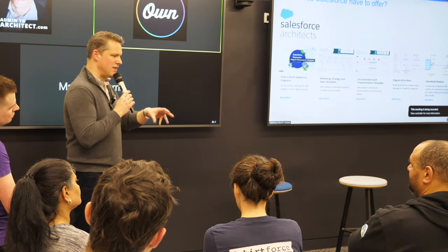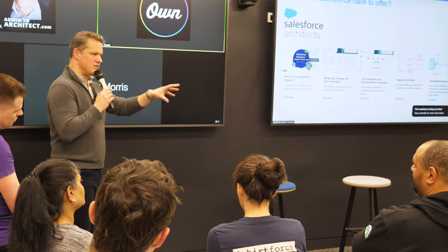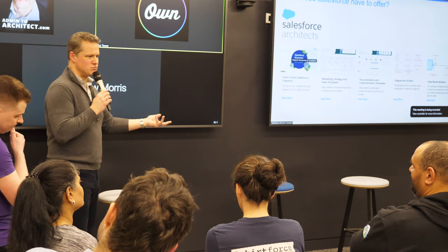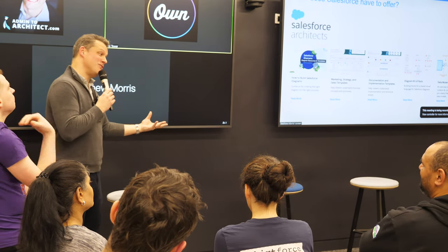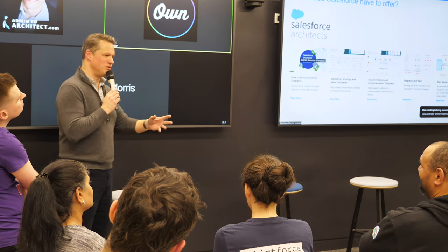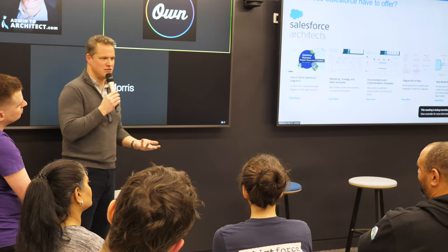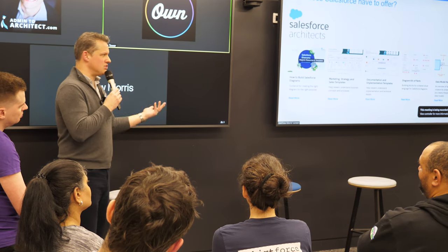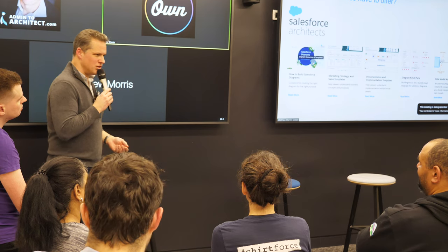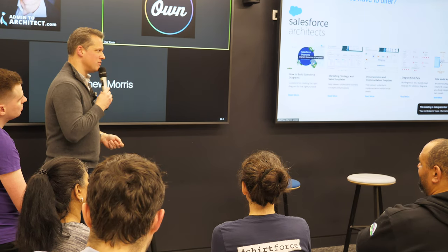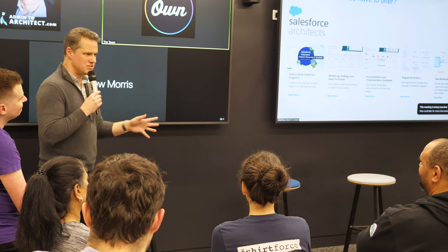Sam was mentioning governance at the beginning. You can put that then as artifacts of, well, here's where we were, and we worked on projects like this, right? Cover your ass. Here's where we were at this point, and then we didn't get to where we wanted to be next time because... and that would go along with other less visual artifacts like your RAID log, where you were talking about all the things that were getting in the way. Does that kind of answer the question a bit?